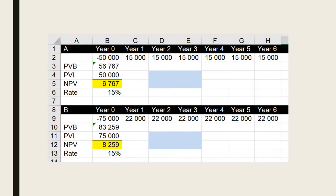Now I'm showing you the solution to that problem. Here's project A — you can see the cash flows at the top: the investment of 50,000, and 15,000 per year as the cash flow for six years. I've called this the PVB, the present value of the benefit of the project — the present value of the future cash flows excluding the investment. That minus the investment gives you the NPV. I've done the same for project B: those are the cash flows, the present value of the benefit, the present value of the investment, and there's the NPV.